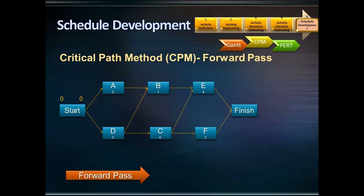Assuming zero days for the start milestone and zero days for the start of activities A and D: the earliest time activity A can be completed is two days, because activity A takes two days. Activity D can finish in five days. Activities A and D are predecessors of activity B, so activity B cannot start until both A and D are finished. The earliest time activities A and D can finish is five days, so the earliest time activity B can start is five days. Continuing the forward pass, the earliest time the project can be completed is 15 days.